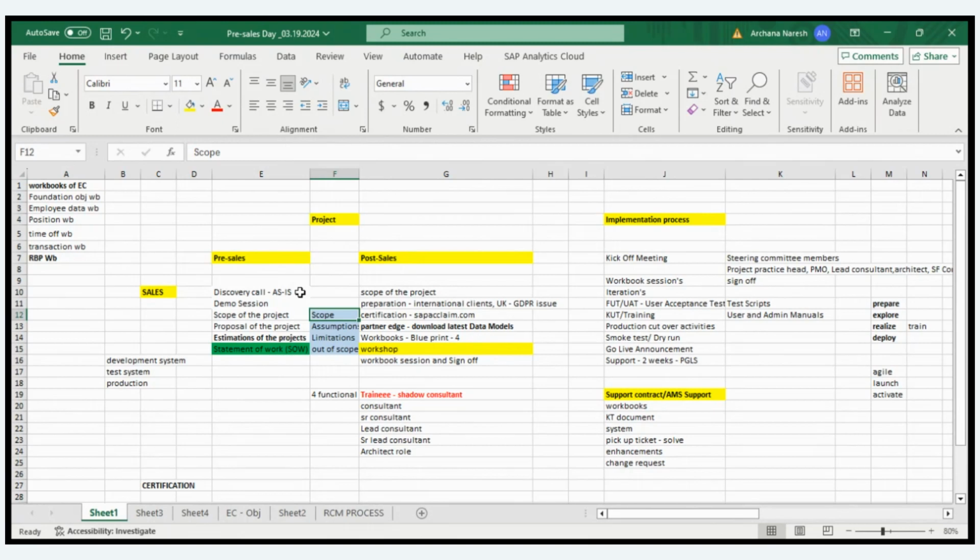Sometimes what happens is they are migrating from, say, PeopleSoft to SuccessFactors. Sometimes they do not have anything yet, so they might be doing everything in Excel, and now they want to get onto a system. Okay, so what are the assumptions that they have? Okay, and what are the limitations, that we are only going to consider, they have 11 countries, but we are considering 5 countries within the timelines. He says, no, no, no, I need the implementation in 3 months, I can't give you more than that. Okay, no problem, you said 11 countries, no? Within 3 months I'll give you 5 countries, and the 6th to 11th country will be a roll up project after go live. So we will slowly roll it up to the next countries.